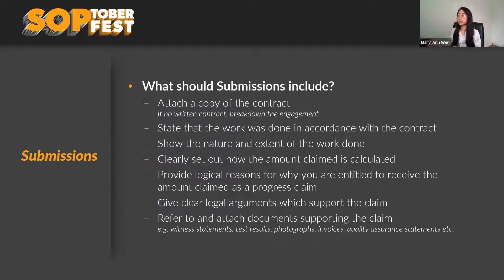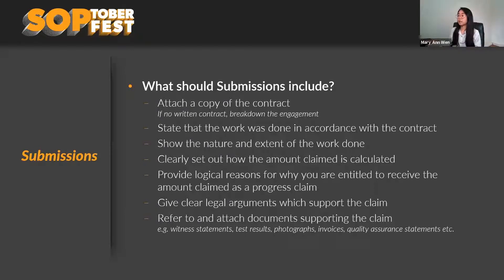The purpose is to show that the works were done in accordance with the contract and that there's an entitlement to payment — whether a variation was issued or works were completed in accordance with the construction program. In terms of the nature and extent of work, the more evidence the better: delivery dockets, photographs, site inspection reports, just to show the works have been completed or supplied. You need to clearly set out how the amount claimed is calculated — whether in a schedule of rates or as milestone payments.